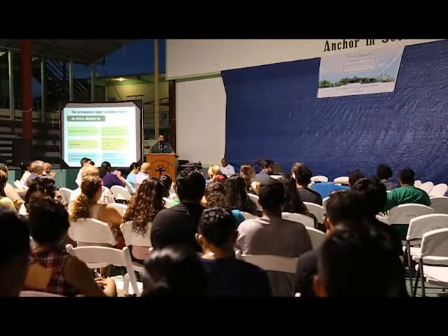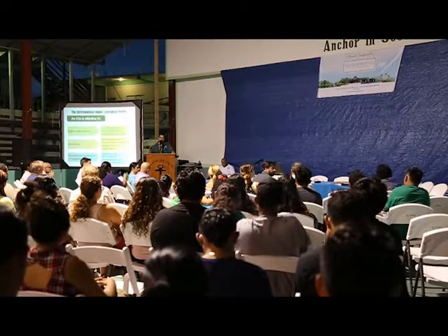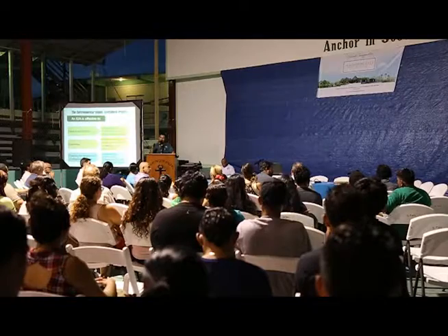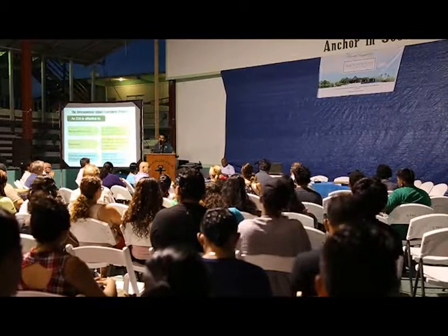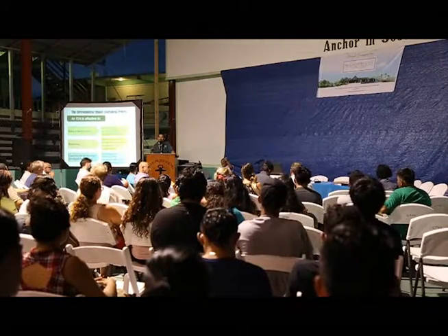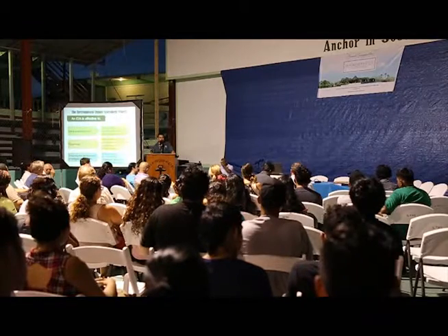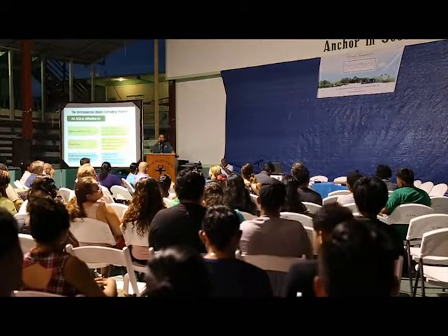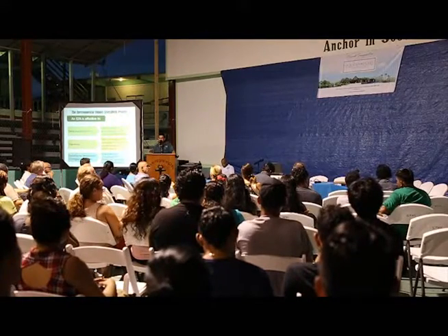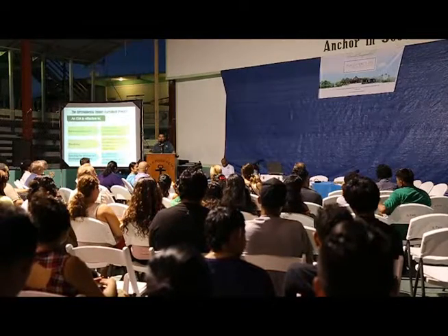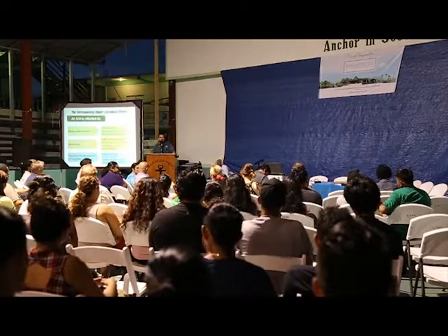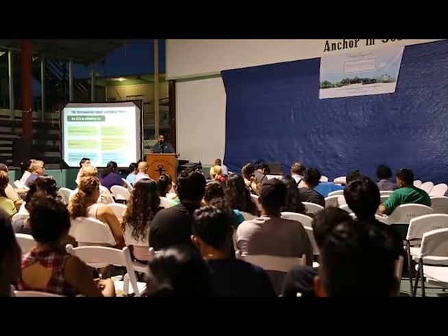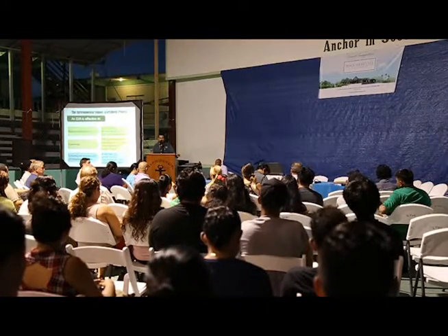And it also ensures that in designing these things, we take into consideration knowing what our negative impacts are, how we can go about preventing one, then we mitigate these things. There's a hierarchy of how you address the negative issues in regards to any development and basically in everything you do in life. Prevention is better than cure. We all know that. So there's a hierarchy that is followed: prevention, mitigation, and then we go to a new terminology that is out there: offsets. But our legislation at this stage does not look into that aspect as yet, but it's being implemented nonetheless as environmental safeguards. So the EIA is effective as a planning tool in examining adverse and positive impacts, and it also addresses the issue of mitigation, preventative measures.